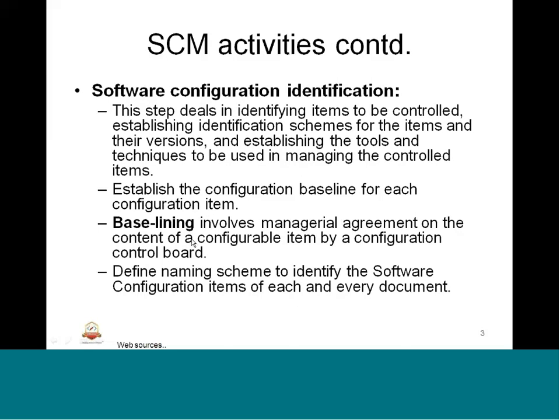Baselining is a very important activity that involves a managerial agreement on the content of a configurable item by a configuration control board. There is a board called the CCB which involves subject matter experts in terms of SCM, project management, etc. Basically they come to a conclusion that this item can be baselined. Baseline is an event on which all the rest of the subsystems or sub-events are going to take place. Like, requirement as baselined means that baseline will be used for testing. That baseline can be used for component testing, integration testing, system testing, depending on the type of baseline that we have.